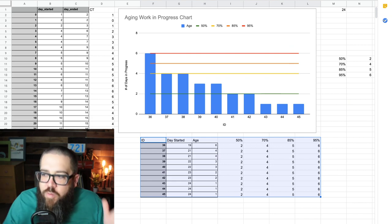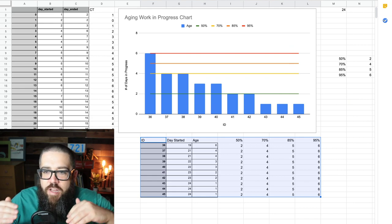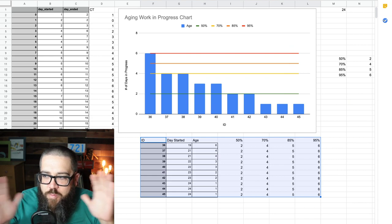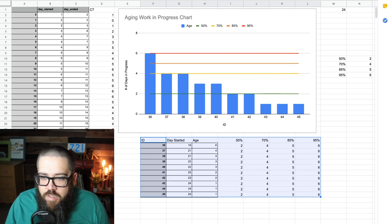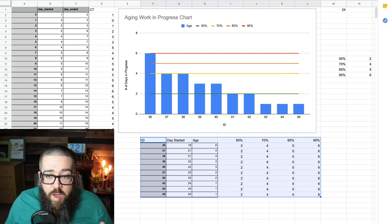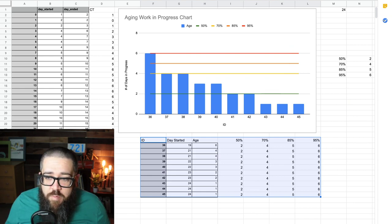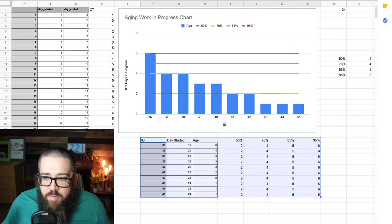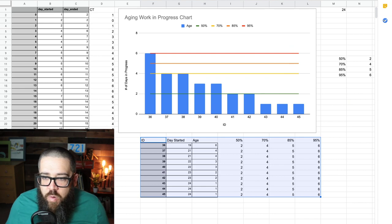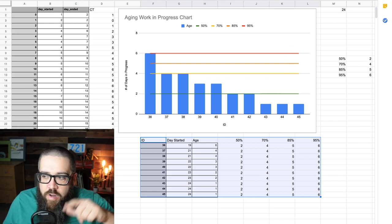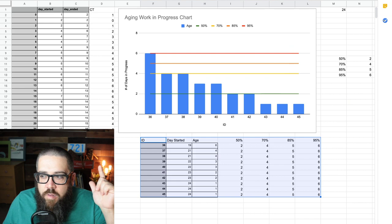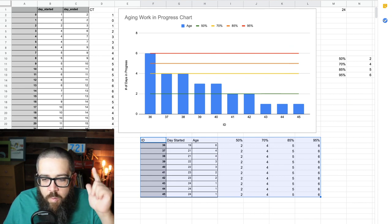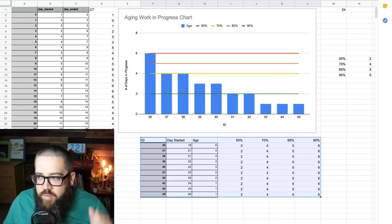So on day 24, they missed what was going on. They didn't see that big item or they ignored it. They're like, oh, we'll finish it. We promise we'll finish it. But they started three more. Didn't get finished. So, on day 25, whether you're the Scrum Master, the Flow Master, the Manager, the Team, they were like, hey, everybody stop for a second here. We've got too much work going on. We should have never started those three items yesterday. This item number 36, whatever it is, that's probably the big bad bug that the boss needed fixing. That's probably why it's taking so long. We need to get it fixed.